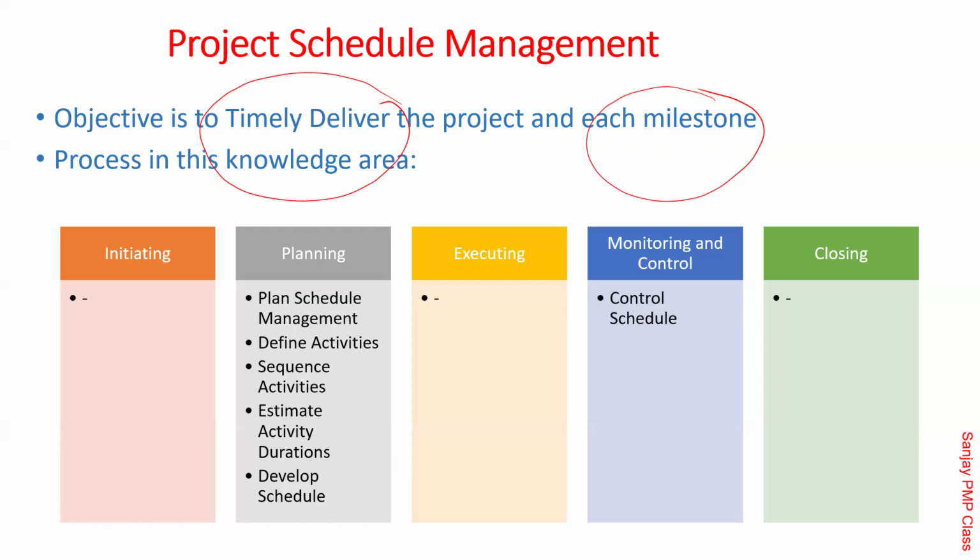And that is written, Swati, in the contract itself, correct? Yeah, you have to give the sign-off letter. When you are sending that invoice to the finance department of the customer, you need to send that sign-off letter saying that your man has accepted my design, so now, sir, release the 20%. Correct? Very common. And that's what I'm trying to say.